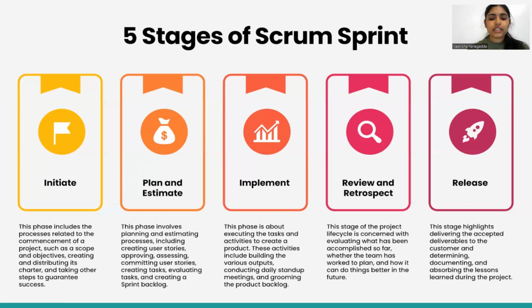During this phase, the team will create the project vision, outlining a roadmap with the main objectives, goals, and deliverables. They will also identify all stakeholders, assign the team members to each role, and determine the epics forming the project backlog. The project backlog is a list that contains features that will be implemented during development, ordered by priority. Once all the processes related to this phase are complete, the team will be ready to move on to the next phase.